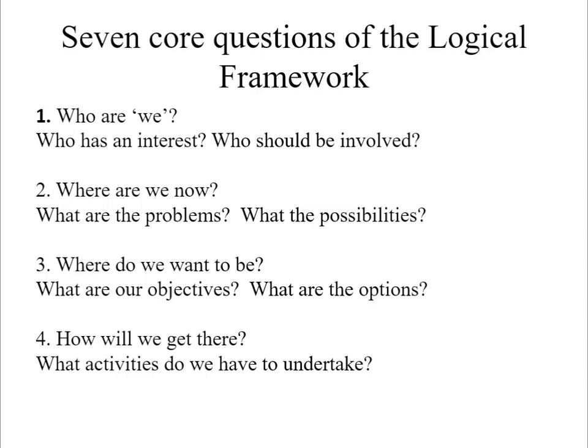The first question is, who are we? Here we look at who has an interest in the project and who should be involved. The second question is, where are we now? Here, we look at the problems and possibilities. The third question is, where do we want to be? At this stage, the objectives are formulated and other options are considered.